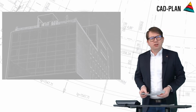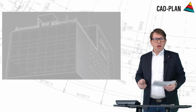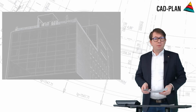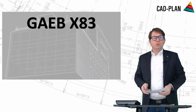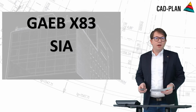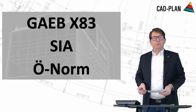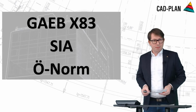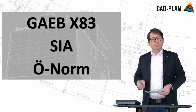What does digital transmission really mean? How could this work in your country? In our region, and I speak about the German-speaking language areas, we use standard formats. That means you will receive a GAEB file, for example in Germany, or an SIA file for use in Switzerland, or an ÖNORM file for use in Austria. These formats can be used in the ERP system, into which you can easily import them.